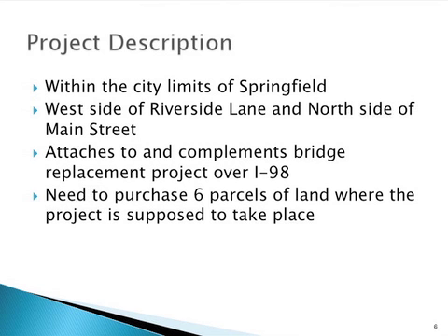The next slide gives a brief description of the location of the trail. It is located within the city limits of Springfield, on the west side of Riverside Lane and the north side of Main Street. As stated before, the trail attaches to and complements the current bridge replacement project over I-98. One final note on the location of the Main Street trail is there is a need to purchase 6 parcels of land where the project is supposed to take place.